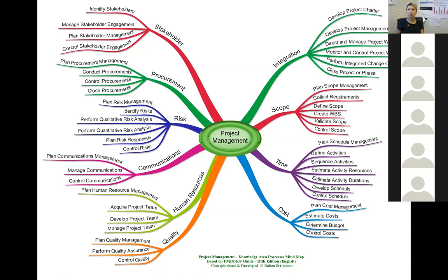So you have to prioritize and focus on a few uncertain events. You can't just watch everything. And if everything or things can go wrong, some of them you have to just accept, some of them you have to insure yourself against. All these ideas we will discuss in your risk management plan.